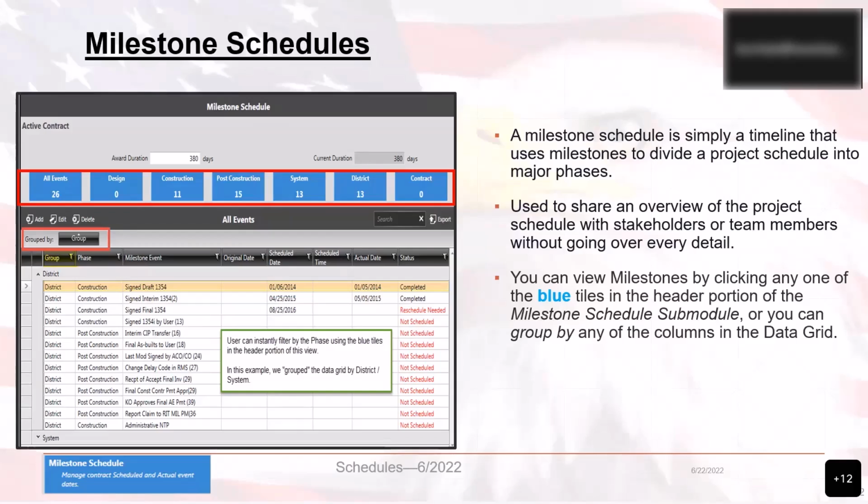Additionally, the milestone schedule is important for many USACE customers as it provides an overview of major events in the contract. The schedule not only includes major system milestones like the contract award date, the notice to proceed, the beneficial occupancy date, but it also includes important milestones entered by the customer, like partial turnover for installing customer furniture, scheduling user training classes, O&M turnover, etc.